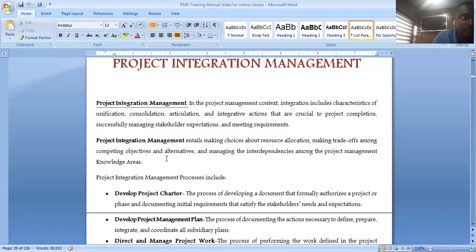If we avoid it, which means we're going to be changing a little of the masonry plan, the civil engineer's plan. And that plan is what will go down to affect the plumber. You see how it is? This is where your integration management is coming in. It's very important to know how to integrate it. You're not making a decision thinking that that decision will solely deal with the plumber, but you're considering all the stakeholders and all the activities that are affected.